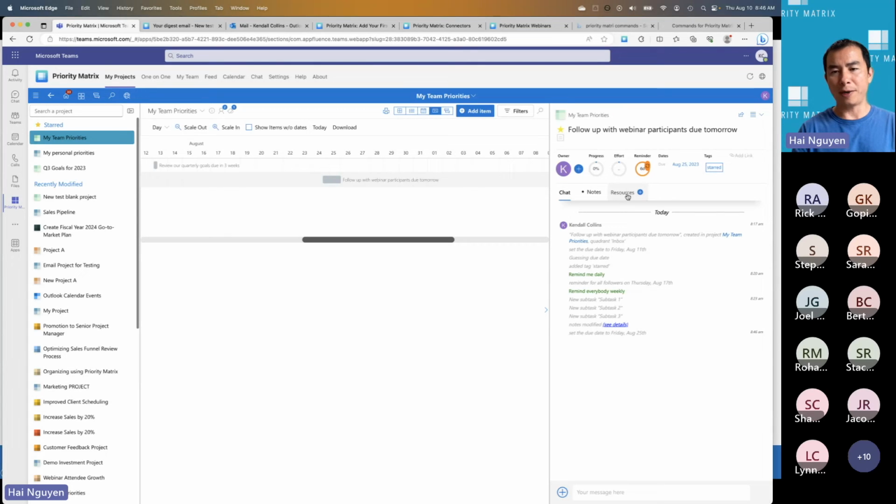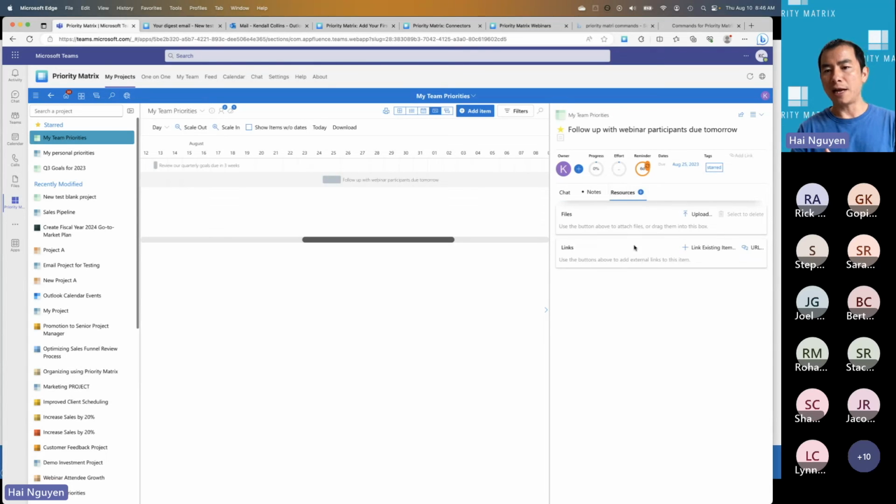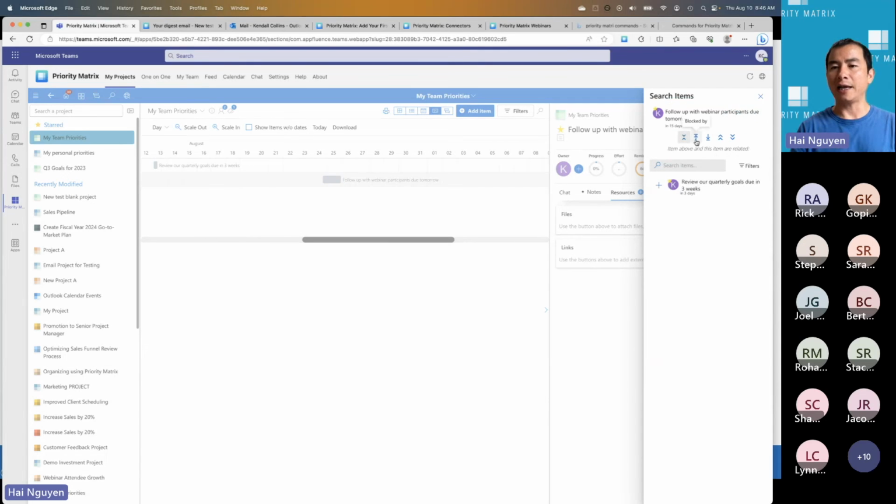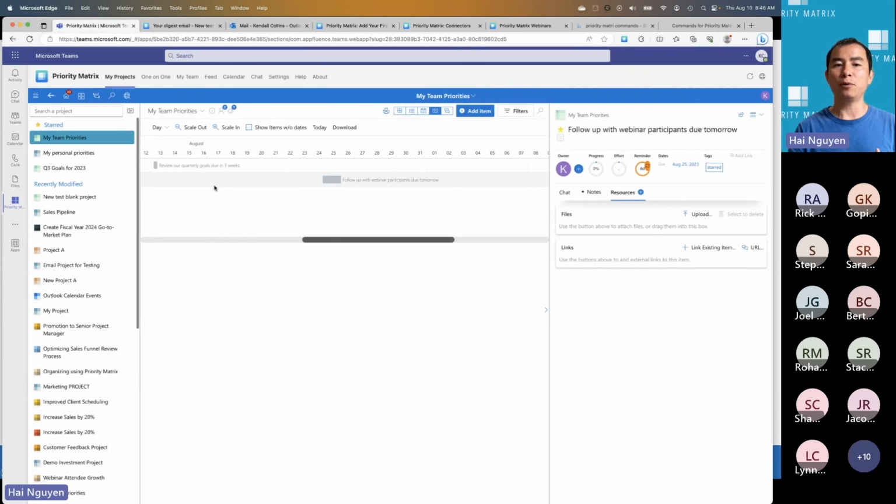And if you go to Matrix resource section, you can actually link to items. For example, I can link items together, and then I can add dependencies. I can say these items are blocked by, or these item blocks. So item A blocks item B. To build a foundation, you've got to pour the concrete before you can actually build the walls, etc. So then task A blocks task B. So you can do all that. And if you do, Matrix will build Gantt charts for you and link them all together.